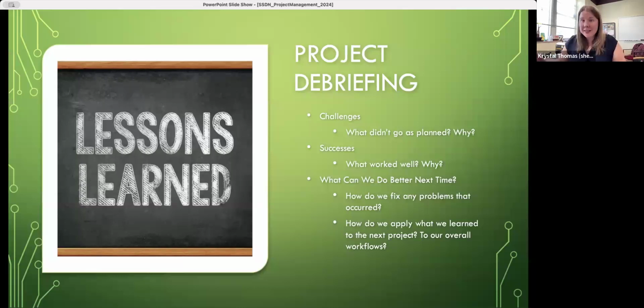So after you've completed the work of the project, yay, now is the time to pause and reflect. And you do this at a project debriefing meeting, which is where you get all the stakeholders together again. So it should be the same people who are at the project briefing meeting, if possible. Understanding people will come and go potentially. During a project debriefing, the following questions are asked and then documented, and you save that in a document with the rest of your project documentation for future reference. So I asked three main questions, sort of the challenges.